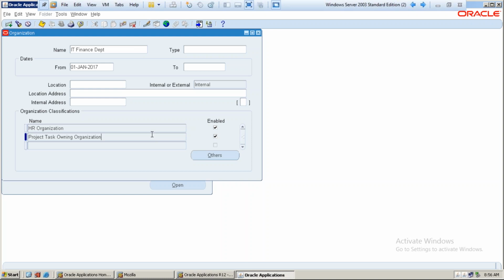Capital projects means whatever expenditures we are accruing, maybe some of them or all of them are capital expenditure. Then we transfer that capital expenditure to assets for capitalization purposes. Those we call capital projects, right?